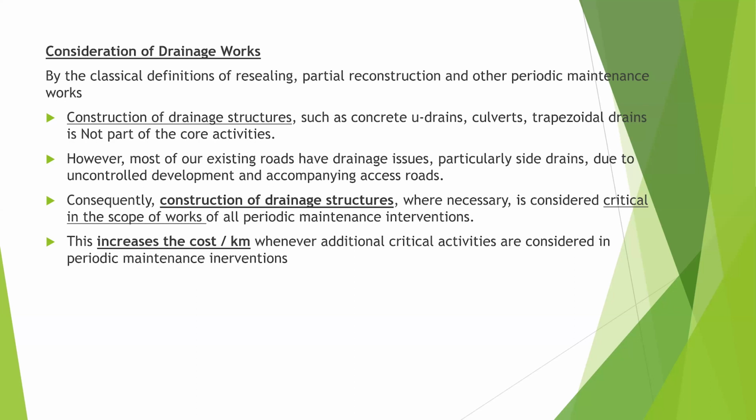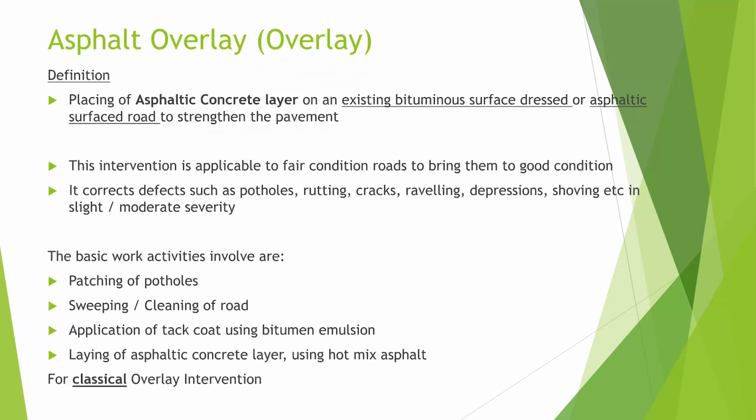So this tends to increase the cost per kilometer whenever additional critical activities are considered. And so immediately you bring in construction of concrete structures, then the activities are no longer the classical periodic maintenance activities. Now we are still talking about the classical periodic maintenance. Next is the asphalt overlay, or simply overlay.